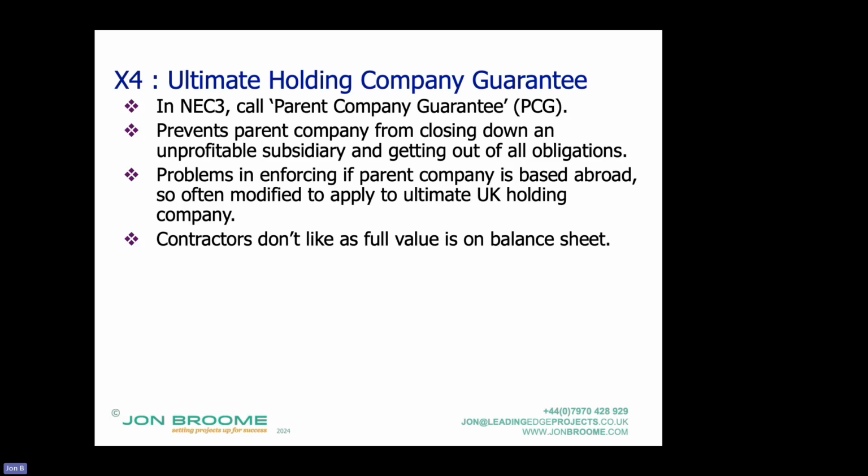So if the subsidiary gets into financial trouble, and it could be on that project going seriously wrong, or it could be on other projects going seriously wrong, the parent company can't just go, well, I'll just close the subsidiary down as a legal entity and hey, then I'm out of there. If they did that with a parent company guarantee, they would have liability to the client for the extra costs in getting someone else in and finishing off the works.